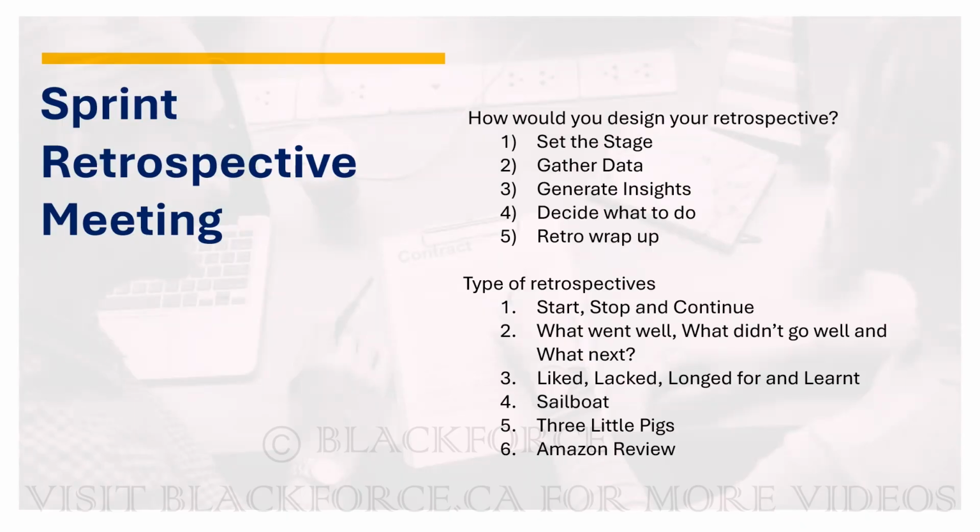It's almost the same thing when you hear people say, do something like an icebreaker, or just get the team to be comfortable. Most retrospectives, you're going to set up like a 1 hour, 30 minutes call. So you want to use the first 30 minutes to get the team ready, to get the team involved, just for them to feel relaxed. So that's what we do when we say set the stage.